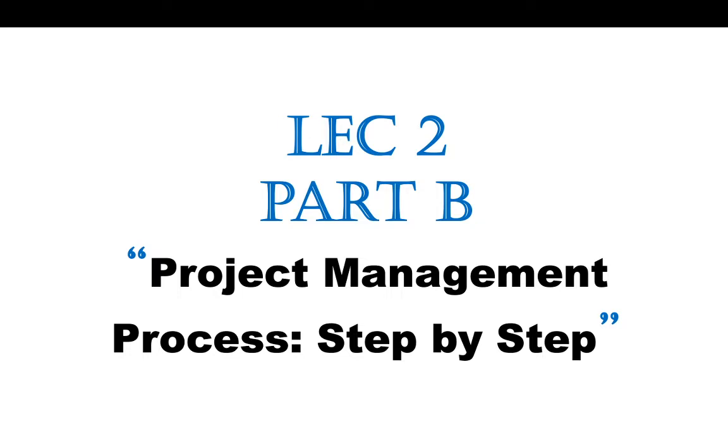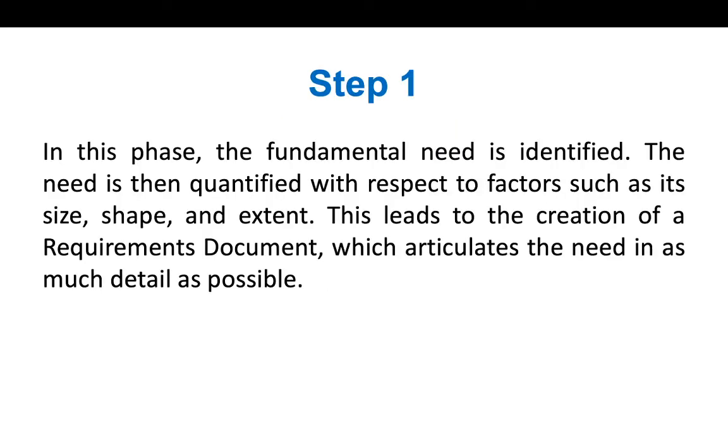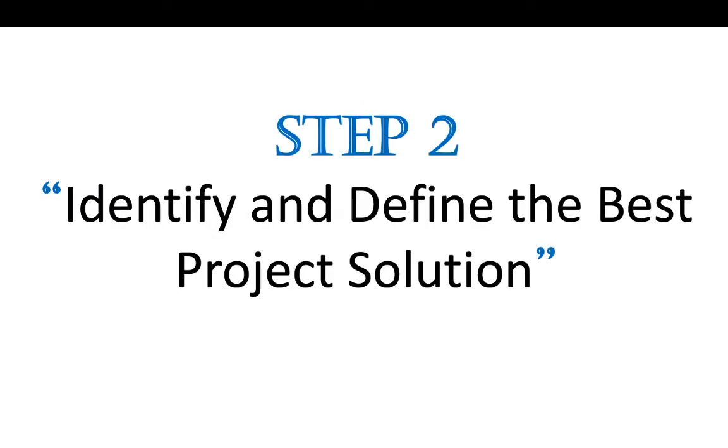So project management process. Here we will study what are the processes for managing your project step by step. The first step, identify and frame the problem or opportunity. In this phase, the fundamental need is identified. The need is then quantified with respect to factors such as its size, shape, and extent. This leads to the creation of a requirement document which illustrates the need in as much detail as possible.